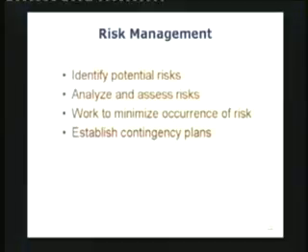Once you've done this, then you move on to analyzing those risks. And there are two dimensions in which you analyze every risk. A risk is an event that is undesirable. One is the impact dimension. How severe is going to be the impact? If something goes wrong, what will be the impact? The other dimension is probability. Impact and probability. If it's a high probability event with high impact, it's a highly risky situation, something I cannot really live with.